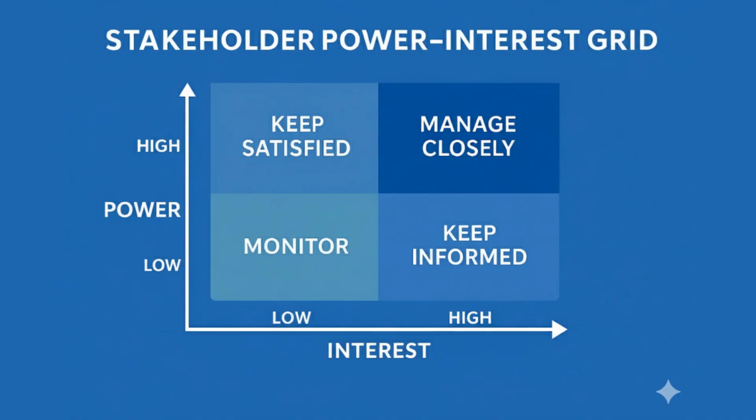They are going to have a high level of authority, but they are going to have low interest in the project. They are all influential stakeholders, but not highly involved in day-to-day details. Example, regulatory bodies, senior executives outside project scope. If you take up the banking example, you can consider the chief risk officer is powerful but not interested in daily system details. You can consider the audit committee, who will care about governance but not coding or testing. You will consider some major shareholders who will influence funding but not day-to-day interest.